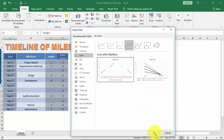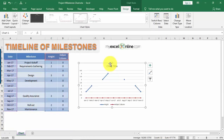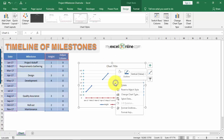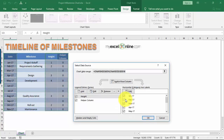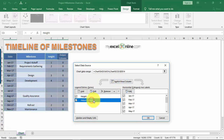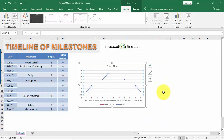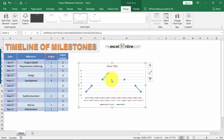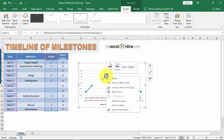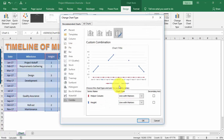We're still far off. The next step is to right-click on your chart and choose Select Data. Select the Helper column and press the up arrow to move it up, then click OK. Next, select the blue lines — the Height series — right-click and choose Change Series Chart Type. Under the All Charts tab, select the Combo chart.